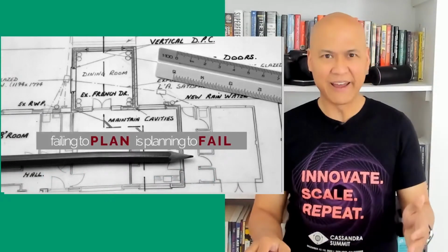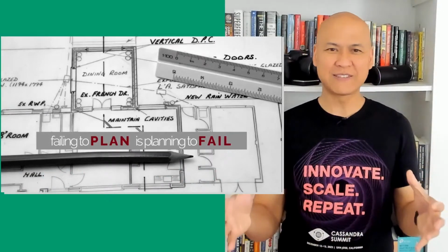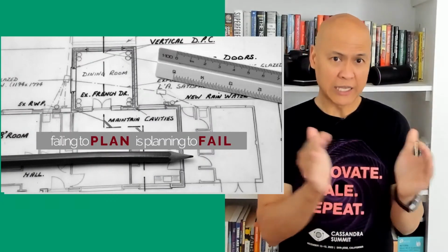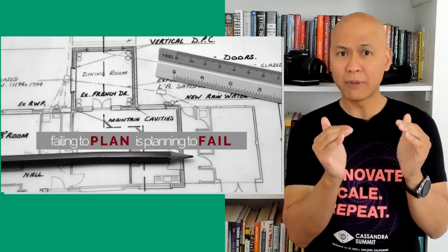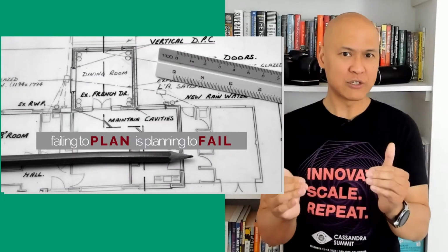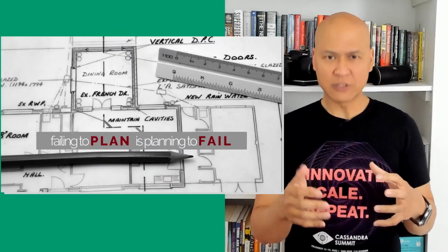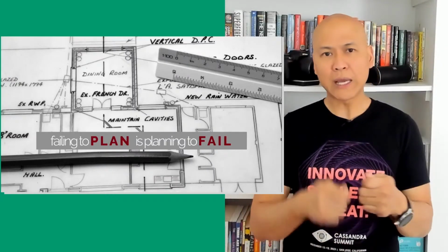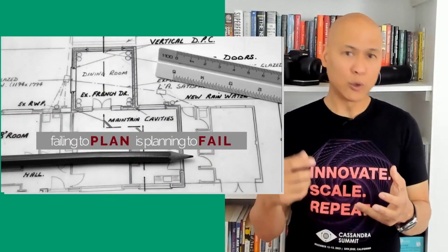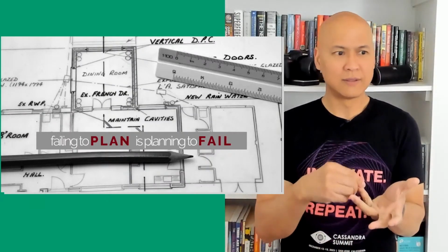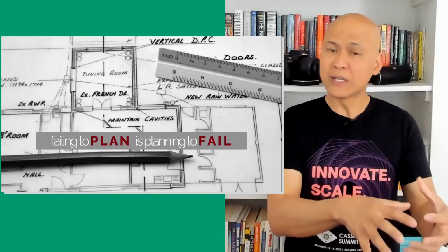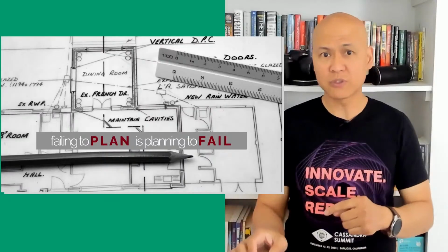I plan. That's one of the reasons when I showcased the upgrade and migration project timeline, I spend so much time on the planning phase. Well, it's really not planning phase, but the pre-migration, pre-upgrade phase. This is where you put a lot of time on planning, looking at different alternatives, different options for doing the migration, looking at DCIA, the destination, content, identity, and availability, and making sure that it is fully tested before you cut over to production. Okay?